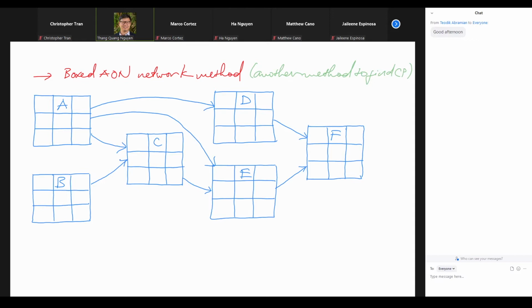Okay, so each box will have 9 cells. And where do you fill in first? The second cells will be very easy because they tell us how much time it takes to finish each of the activities, right? So, for example, A takes 1 week, right here, down here 1. B takes 4 weeks, down here 4. C takes 3 weeks. D takes 4 again. E takes 3 again, right? And the wedding day activity is only 1 day, so we call that 0 weeks. So all these numbers that you see right now are the duration. How long, right? That's the duration.